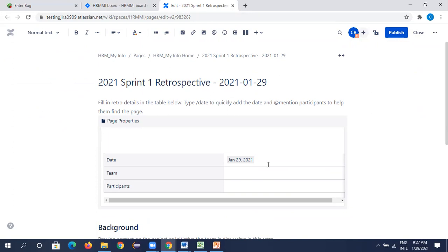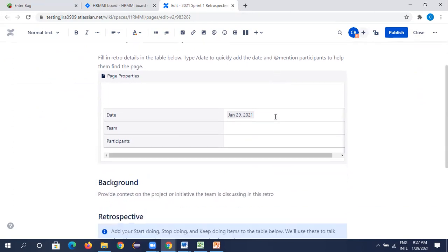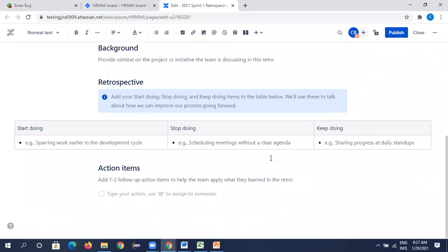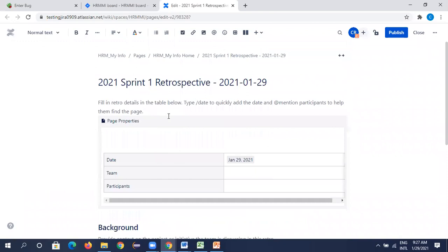So everyone can go through it. What the Scrum Master will do is, in the next retrospective, he will go back to the previous retrospective document and look into it, and see what we wanted to improve, what we have marked to improve, and whether we have started doing that or not. So if we are doing and following all the items, he will close the items here in this Confluence page. Okay, this is how the Confluence page will be used.